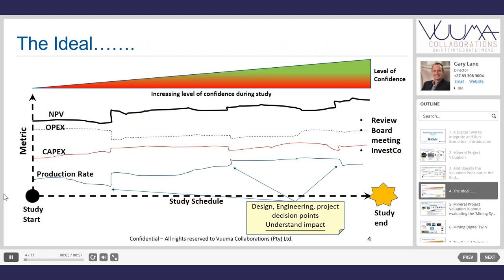Ideally, we need a techno-economic model of the study right from the minute the project starts. It could be a very high-level, top-down model so that you can plot production rate, CAPEX, OPEX, and NPV as the project progresses. As you do design, engineering, and make project decisions, you understand the actual impact on the financial numbers. The level of confidence increases as more information is gathered, enhancing the model so you can make proper engineering optimization and value-based decisions, tracking the project through its full study.